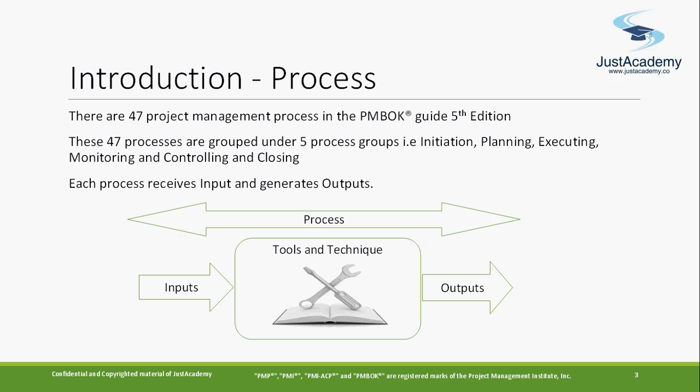So we talk about this process, and there are a total of 47 project management processes in the PMBOK Guide edition, and those are basically grouped into 5 process groups: initiation, planning, execution, monitoring and controlling, and closing. And when I say the process, input, tools, and